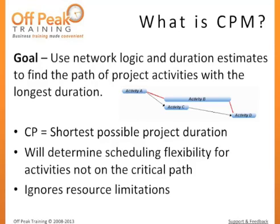Activities not on the critical path will have some scheduling flexibility. In this example, a delay in activity C does not necessarily lead to a delay to the project. As long as it finishes before activity B, it should not affect the start of activity D or the finish of the project. It is also worth noting that in most applications, Critical Path Method will not account for potential resource limitations. Network logic should be the only driver since resources can always be added.